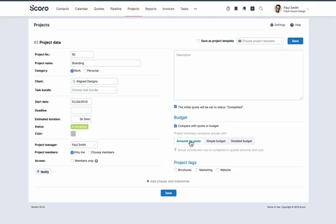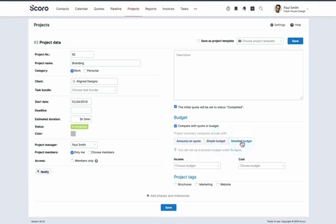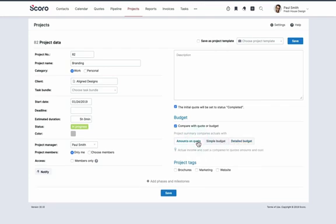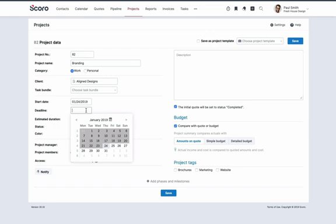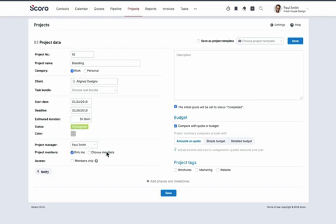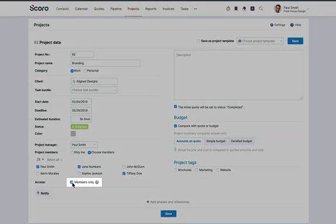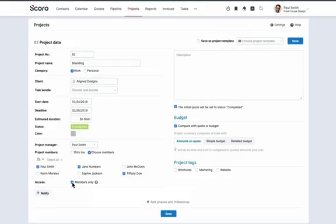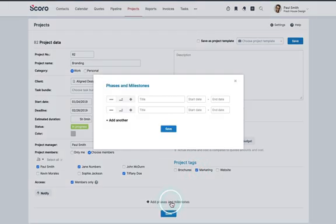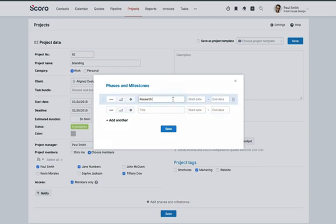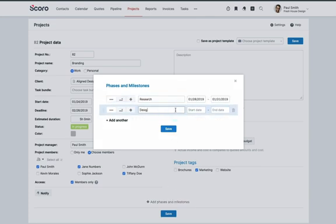Alternatively, you can choose either a simple or detailed budget. You can learn more about budgets in our Help Center. Let's add a project name, specify the deadline, and choose the project members. Tick the box for Members Only Access if only project members should be able to view the project. Otherwise, everyone who has permissions to view other people's projects can access it. Add tags to your project so it's easier to find later. If you're dealing with a longer project, you can add phases and milestones to further structure your work. For example, Research and Design. This step is entirely optional and depends on your workflow.